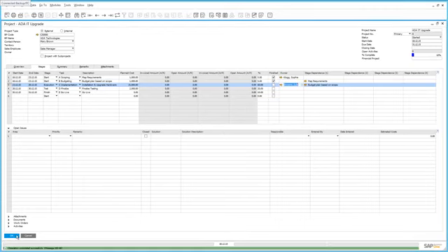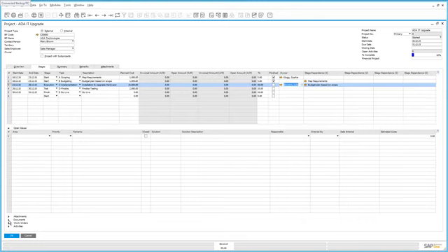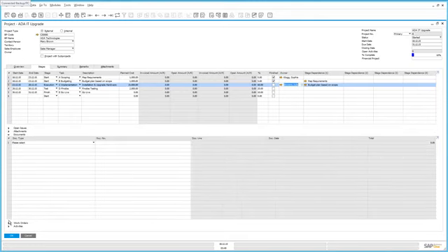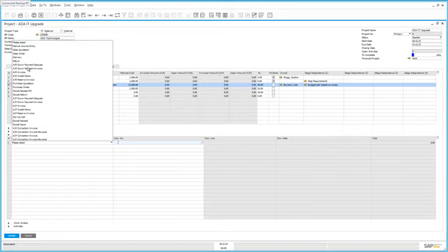Julie has at least spent some time on the implementation phase, and as a result, we can now start posting expenses. If we move to the Documents part of the project window, we have the ability to select a delivery document, for example, and corresponding AR invoice to a particular project. Julie Bowens has worked 10 hours on this particular project for the implementation stage, so we can actually invoice 10 hours of labour items. So let's now select the delivery document that we created by simply selecting the right document